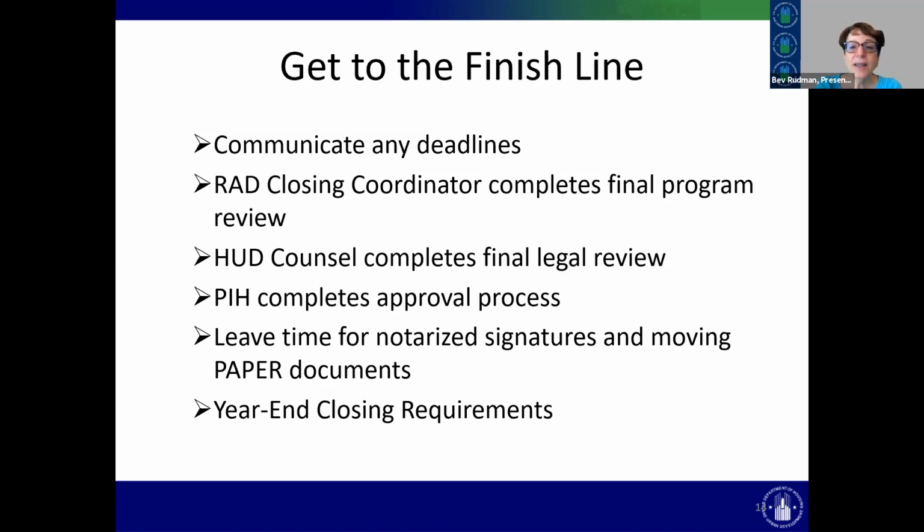Then we have a signatory who has to connect with a notary when both parties can be in the same place. Then we have to get those documents scanned, and then they have to get taken to a UPS. Where that all used to be in one building, that's not the case anymore. So again, I would encourage you, when you're thinking about your deadlines, move them up a week or two. Aim for something where you have time for documents to get to where they need to be.